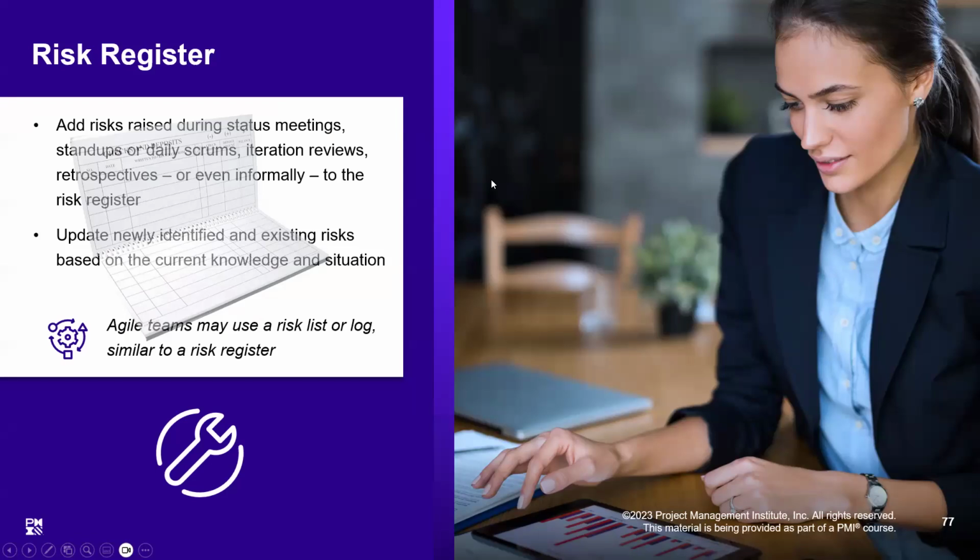You remember we talked about recording all the risks which we identify into a risk register. But this risk register is a live document. Although during the planning we did a very comprehensive exercise of recording all the possible risks in the risk register, we must keep updating it because we understand that the identification of risk is a continuous process, and even till the last moment of the project, we may be identifying risks, assessing them, analyzing them, creating the response strategies, and all that.